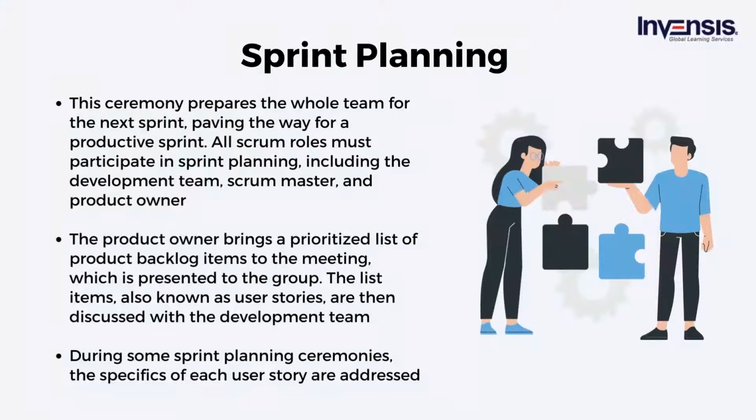First Scrum ceremony is sprint planning. This ceremony prepares the whole team for the next sprint, paving the way for a productive sprint. All Scrum roles must participate in sprint planning, including the development team, Scrum Master, and product owner. Clearly, the planning occurs before the sprint. It normally lasts between 1 and 2 hours.